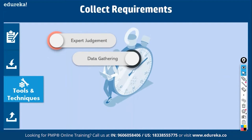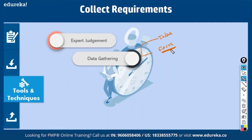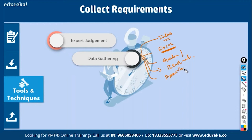Data gathering refers to the ways in which you gather requirements. You can have interviews, focus groups — where people with focused attention on specific aspects of a product provide input — questionnaires and surveys for large numbers of stakeholders, benchmarks if you want to live up to some industry standard, or brainstorming for gathering creative ideas. Data gathering basically refers to all the ways in which you'll be gathering requirements.